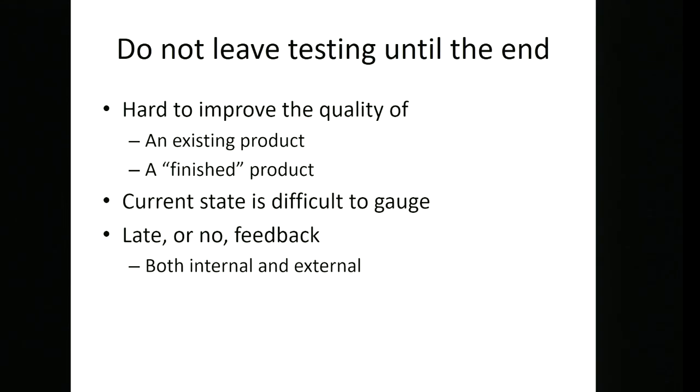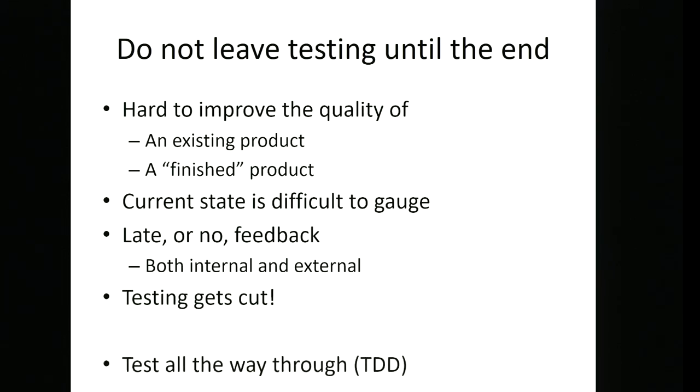But if we had all those tests, if we had 100% coverage of the code, or nearly 100% coverage of the code, then if we show something to the product owner or a customer, and they say, "This looks great, is it done?" then we can actually have a definitive answer: yes, it is done, it's fully tested, and what we've shown you isn't just a nice path through the software that we know is safe. We've talked loads about how if we leave testing to the end, it gets cut, and so this is why we say we should test all the way through with TDD.